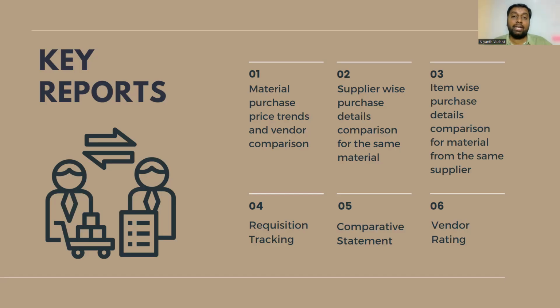That also needs to be taken in consideration, because you will not be ordering only one material from same vendor. There are chances of ordering multiple materials also. It is easier to order multiple materials from same vendor because management is easy. Let's say you're ordering emulsion from one vendor, enamel from one vendor, primer from one vendor. Then it is a huge complexion in terms of understanding and managing different vendors at the same time.